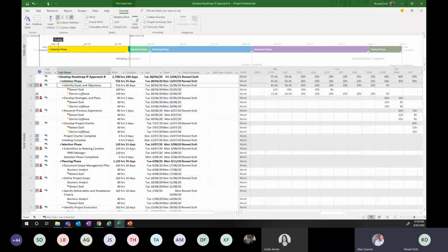It's a great question, really, because the purpose of a schedule and the purpose of a task quite often fulfills several different needs. On one hand, when I update my timesheet, I want to know that my timesheet manager is aware that I've worked 40 hours, but he doesn't really mind whether I worked on 1 or 5 projects. On the other hand, when I update my timesheet on project tasks, at the same time I want to update those 5 different projects that I've been working on. So this particular timesheet functionality fulfills both of those needs.